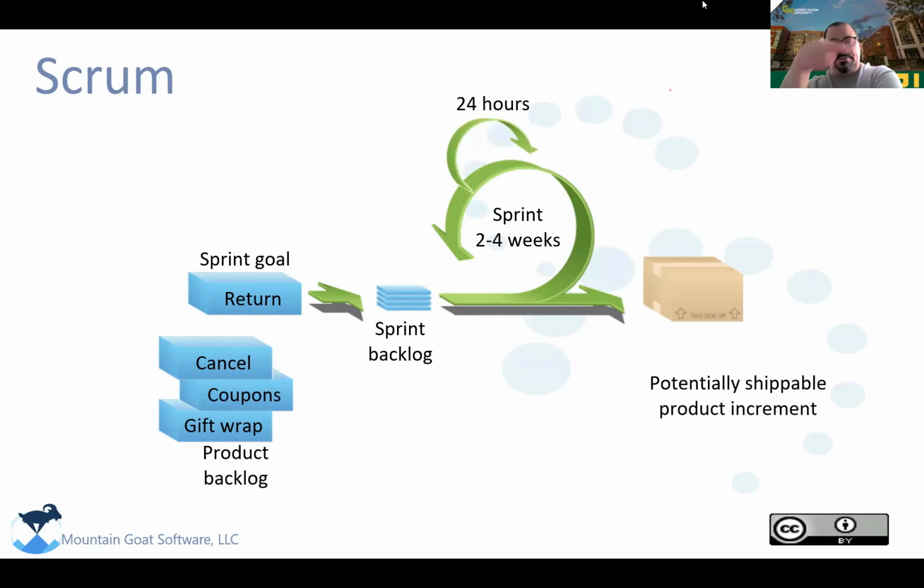Inside the sprint, remember that I talked about accountability. Every day you have one ceremony, the daily meeting. What is the daily meeting? It's a meeting where the whole group meets together, standing up, at the same time every day and says what I did that day, what I will do tomorrow, and what my problem is. And there is one person, the Scrum Master, who is responsible for solving the blockers. For example, I finished code A, but I plan to work on code B, but I don't have the server credentials to solve task B. And the Scrum Master says, okay, stay here for 5 minutes after the meeting and we'll solve your problem.